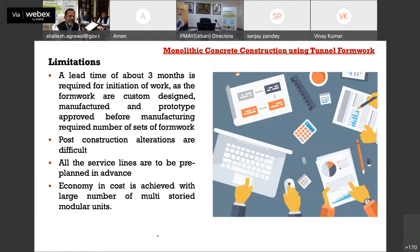And also another best practice is, whenever you employ these kind of formwork systems, always keep one set extra. Okay, so if you require 2 or 3 sets, take one more set extra, because in case of anything going wrong, you can always make use of that formwork.